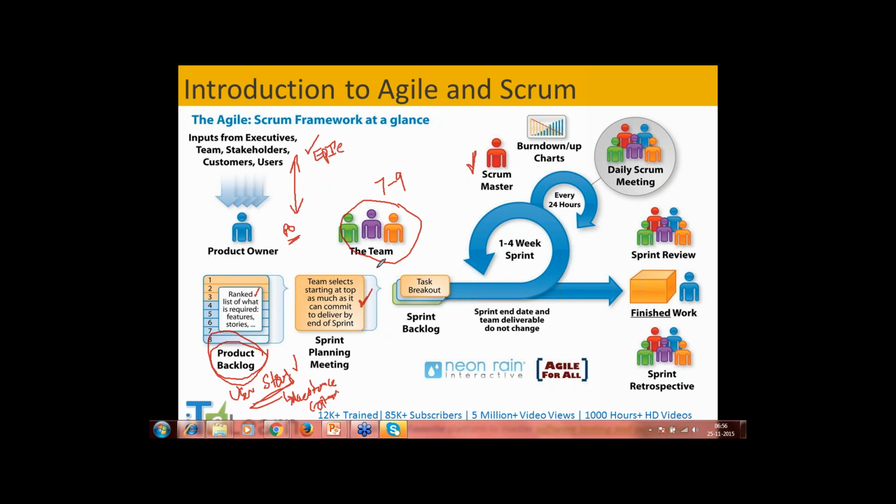So a team will estimate each user story and then say, we have 10 user stories to deliver, but we can deliver only one user story in the next 4 weeks, or we can deliver two user stories in the next 4 weeks. They will communicate that back to the product owner. The product owner will communicate back to the business team, saying in the next sprint we are taking up this particular user story, something related to developing a UI or a screen or developing individual tax calculation, whatever it is. He will get an approval from the business, and then the team goes ahead and plans it. That is called the sprint planning meeting. In the planning meeting, they spend a good amount of time analyzing that user story, and under the user story, they create detailed tasks.